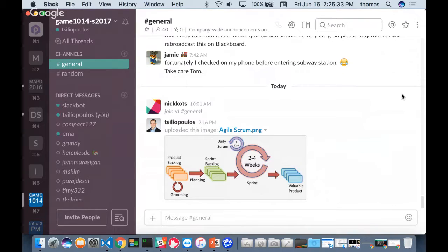I have a feature set. And how do I build out that feature set? It's got to be based on what I want it to do. It's almost like my business requirements for my game, right? So we build up something called a user story, all right, before we build the feature. The reason for this is because it's a little bit more abstract, and then you can have multiple solutions for the same user story. Example: as a user, I should be able to know that my character is being hurt. That's a user story, right?